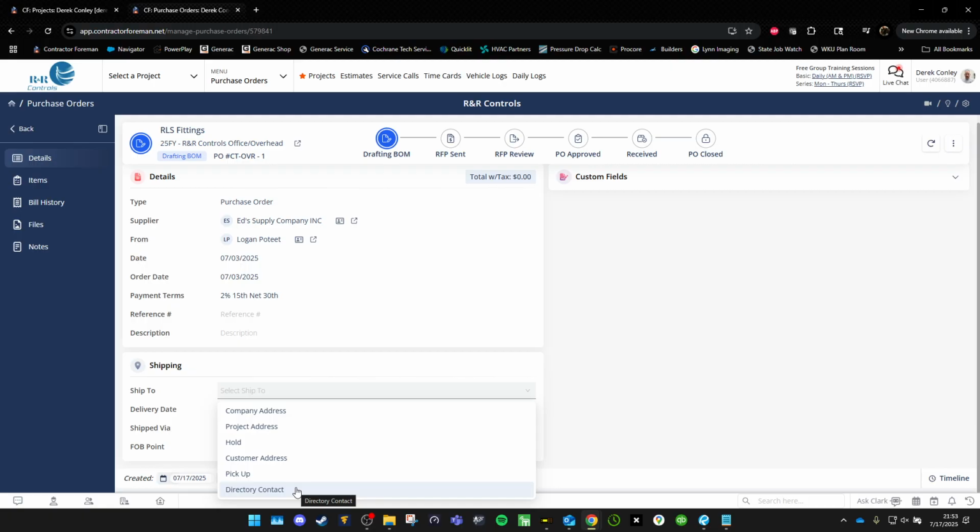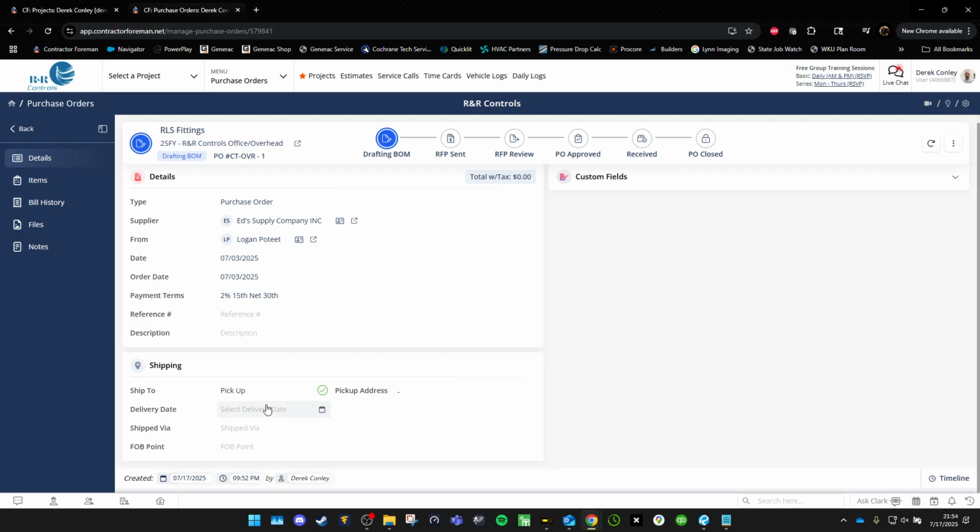Sometimes we might use the directory contact. Let's say that we're ordering material that we have to provide for another contractor for them to install. Well, we're going to order it, and we're going to have it shipped to them because it's a lot sometimes. So we can ship it directly to them using their directory contact. In this case, we're going to pick it up. And since we're picking it up, we know we're going to pick it up the same date. And that takes care of the details page.